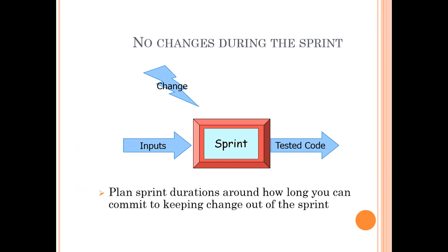One more important thing. Lots of product owners or stakeholders try to add some priority or immediate requirements, very high priority requirements, during the sprint execution or in the middle of the sprint. But it is a standard convention of Scrum that for the current sprint, once we get started, no requirement would be added.